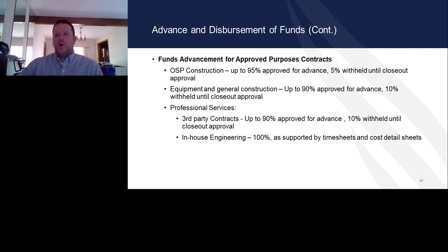The borrower shall only request advances as needed to meet obligations promptly. Generally, we do not approve advance requests for more than 60 days before the obligation is payable. There is a little bit of flexibility we can adjust on that 60-day time period because of the processing time, but this is something that you need to work with your GFR on when you're looking at requesting advance on funds prior to obligation payable.